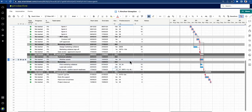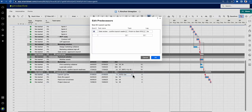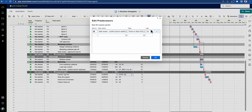If we look at the launch and go-live task, you'll see it has a predecessor of row 41 with a finish-to-start predecessor. What it's saying is: row 41 must be finished and there must be a two-week gap before the launch takes place — finish to start plus two weeks. So that's a predecessor, and you can see there are various items here.